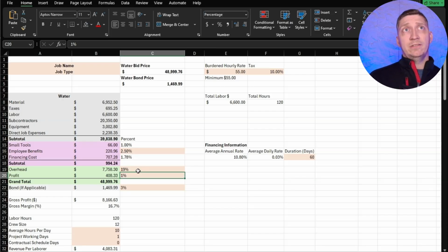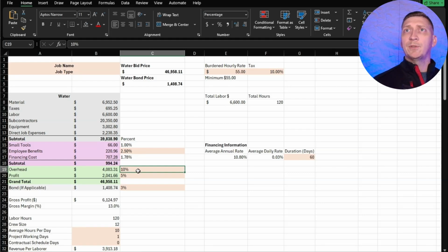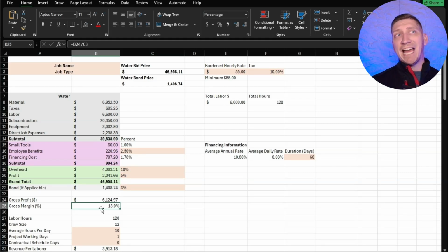The other downside to all of this is you might think, hey, under 15% is a great overhead, because that's what a lot of people believe. But if I put 10% here and 5%, like a typical change order, you're allowed 10% overhead, 5% profit. The way that the math comes out when you stack it, it comes out to 13%. If you have a 14% overhead, you are literally paying 1% of whatever that change order is. Let that sink in for a second.